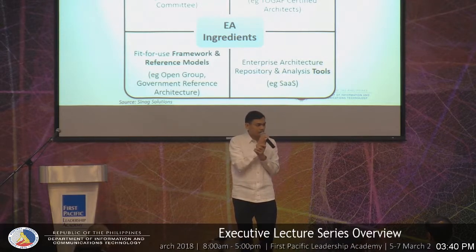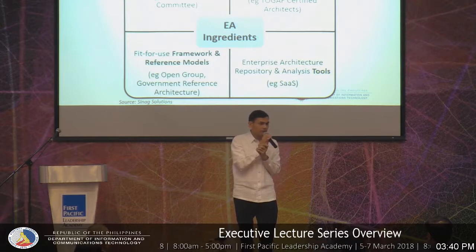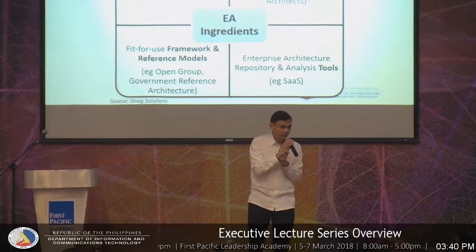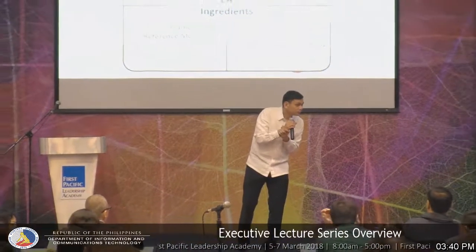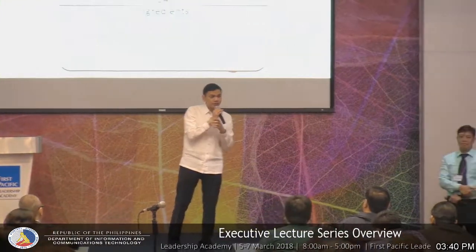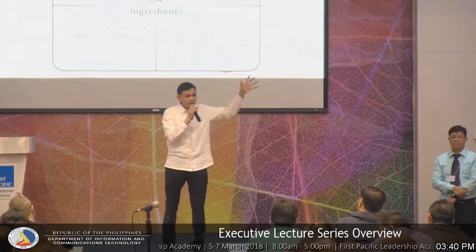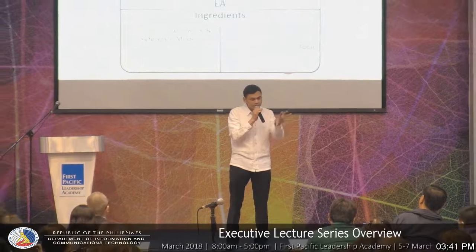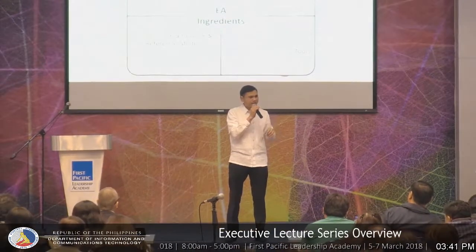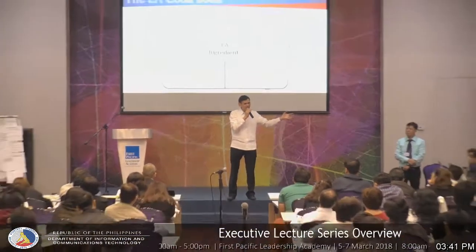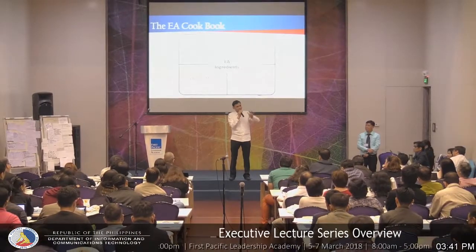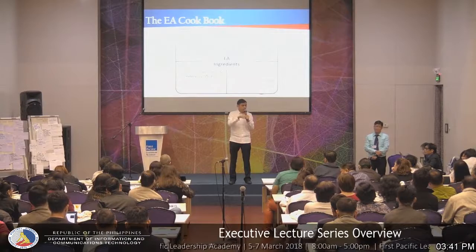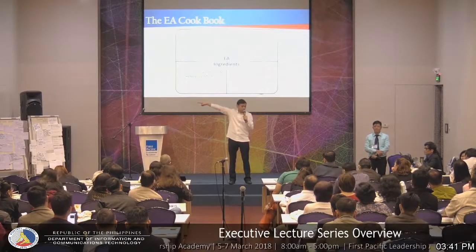The architecture was for 2-3 months. The development was for another 10. Sorry, no delay, 11 and a half. Less than 2 years. But the scope was not the whole enterprise of TOEA. The scope was roughly 30% of their systems, because they had an incumbent system already that they didn't want to replace yet. So that was not in scope. It was for new OFWs going to be assigned abroad.